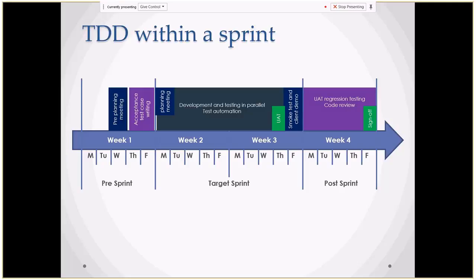If we find any defects from the UAT cycle, based on the criticality, let's say we find a critical or blocker issue, the production deployment will be cancelled. If the capacity needed is very small, we can fix it within a shorter time period, and we will send it to the same sprint. If not, we will send it to the next immediate sprint, along with the low and medium defects that we find in UAT.